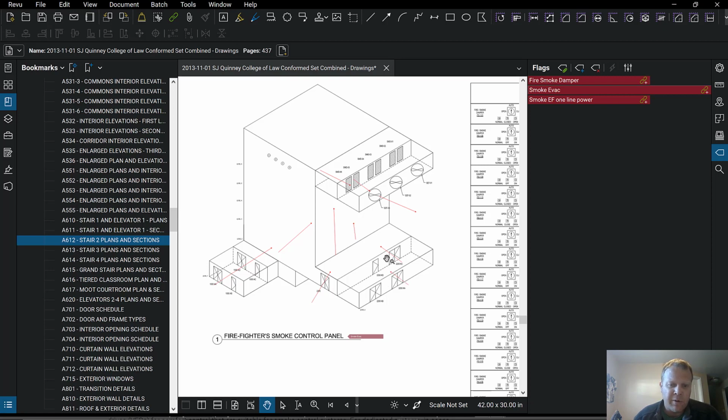It's a series of coordinations. It's a series of doing testing to make sure certain things are working. And like I said, all that layering effect. This is working now. This is working now. That's working now. That's working now. We can try and put multiple systems together and test them out, pre-functional test them, and then move on to the more final tests where we're simulating real events, like they were doing in those YouTube videos that I was showing.